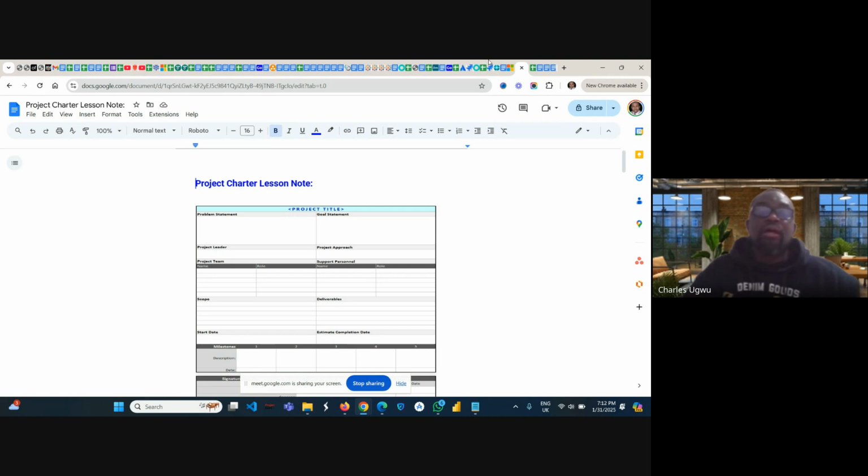solution for better market ITSM. So it's a project charter. You see here they captured the project title, project sponsor, project manager, their names. Then you capture business need, objective, scope, deliverable, then milestones, and budget estimates.